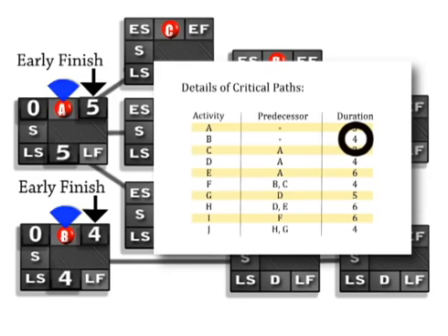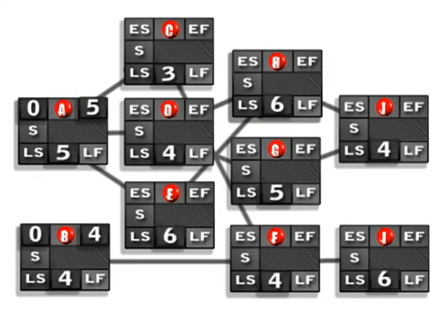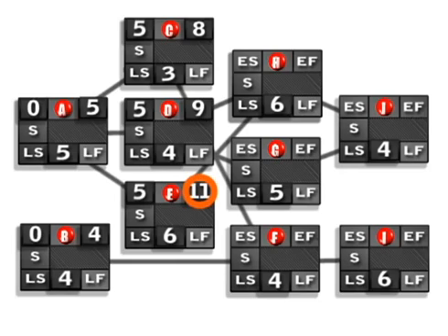0 plus 4. All right, so we've done the first 2 tasks. Now we're looking at this diagram and we see out of activity A that we have 3 arrows. We don't have to make any choice. We automatically know that the early start for each one of those activities is going to be 5. Again, we're going to calculate the early finish. 5 plus 3 is 8, 5 plus 4 is 9, 5 plus 6 is 11.